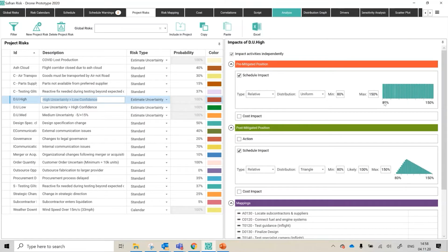So maybe this is for an activity sometime in the future, like 4 years into the future. We have no idea. We're not arrogant enough to know what the most likely is going to be. So we've got an idea. It's in the schedule as part of the deterministic program, but we're going to plus or minus that by 20%. It could be quicker, delivered sooner, but maybe 50% overrun potential. So that's broadly what I've got going on in the background here, just for your information.